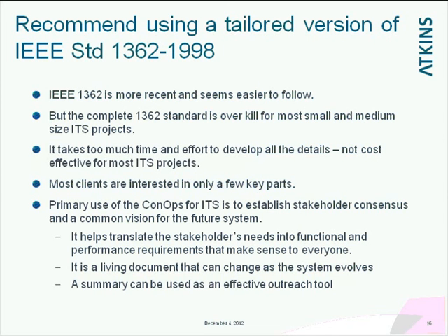the other thing about ConOps is that when you get it all done, you can write an executive summary that is 1 or 2 pages, and it can become a very effective outreach tool for the public, and it explains the system very succinctly and what's coming. So it's a very powerful tool to use to manage expectations.